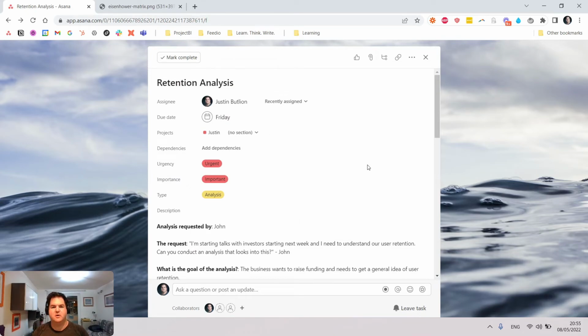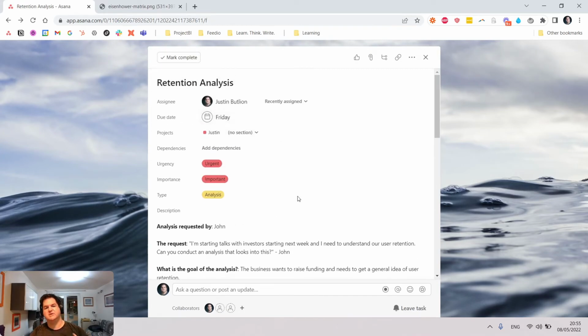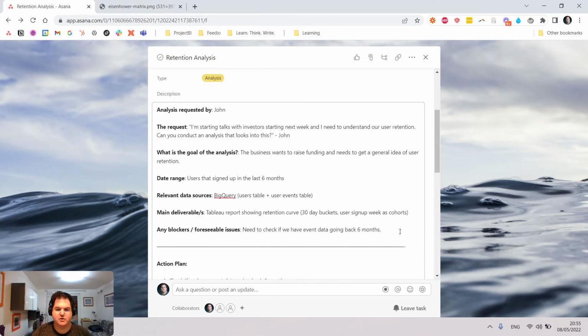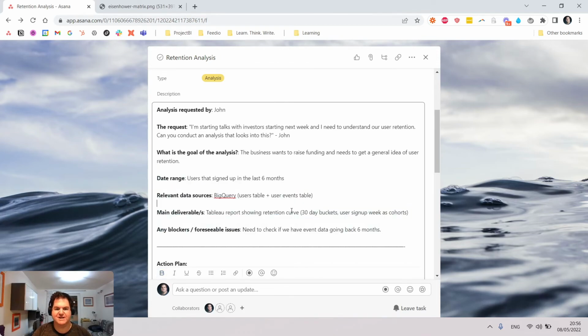When working on a complex analysis, the way you should tackle it is, if you're using a task management solution, a project management solution, then go in and write it up, set the priorities, the due dates, all the relevant information around the piece of work. Start asking a lot of questions so you really understand at a deep level what's being asked. The technical questions as well: which data should we use, the date ranges we want to use, the fields, the tables, all the technical stuff.